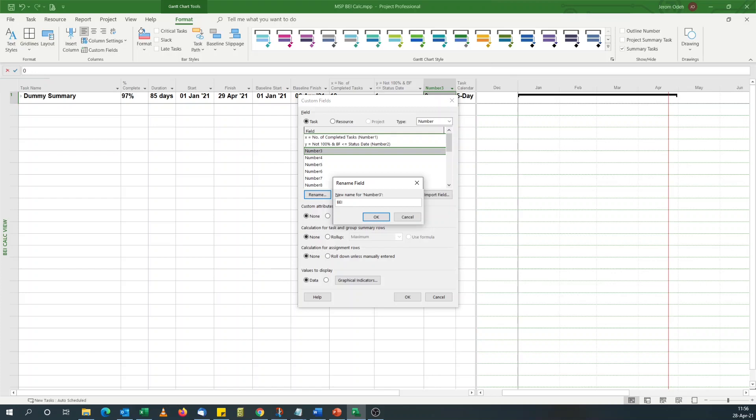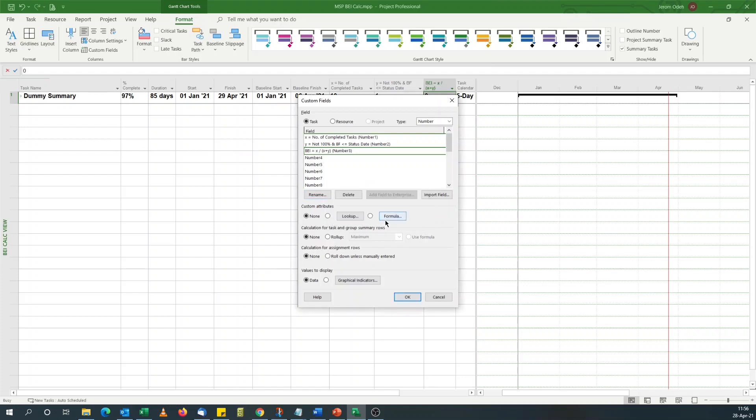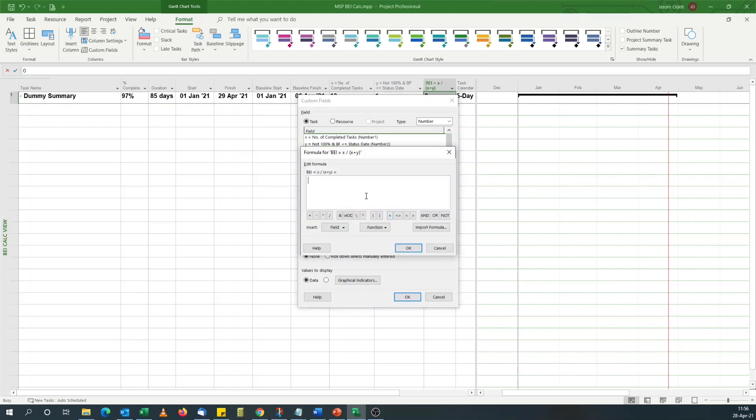I will name this BEI. You can say BEI equals to X divided by X plus Y. You'll have that formula at the back of your mind.